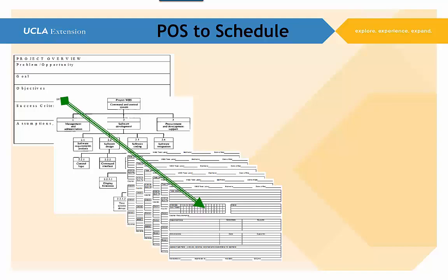What is this based on? Is this based on an estimate from one of our subject matter experts? Maybe we've got a bid outside from 2 vendors we use as the basis for the estimate of this task. So by having this kind of information on each task, we have a very good foundation, a solid foundation to put together the best cost estimate that we can possibly come up with.